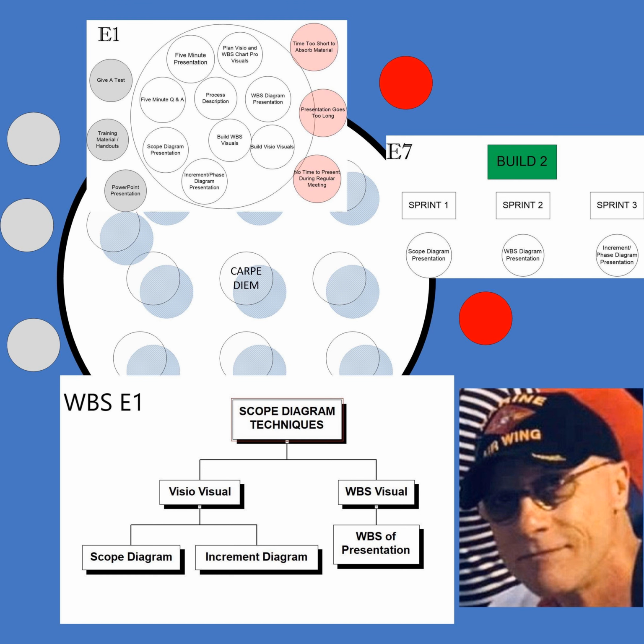But at this point, at the end of that, you've got your stakeholder list. You've talked to everybody on there. You've got your scope diagram. You've got your work breakdown structure. And remember, you're going to get the sign-offs for these. So everybody agrees. So when upper management says, yes, I agree that this is in your scope and these things are out of your scope. Now, can that change later? Yes, but they'd have to go through a change process. So if someone says, this should be in your scope as well, okay, it's not now.